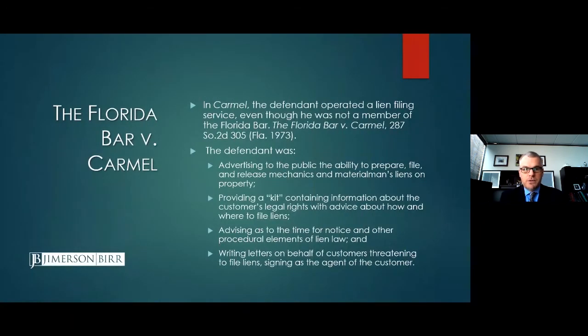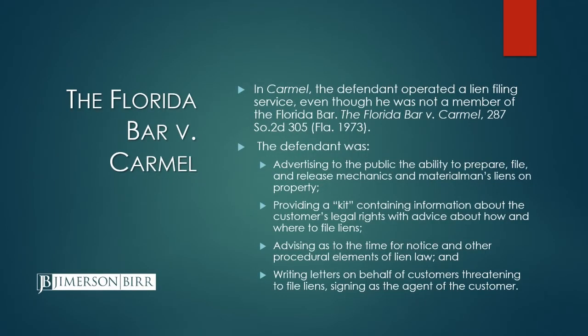This Florida Bar versus Carmel case is an interesting one. I won't go into all of the details, but what this case says is that a lien service cannot prepare and sign a claim of lien. That is the unlicensed practice of law, if you're a non-lawyer or not an employee or authorized agent of the company.